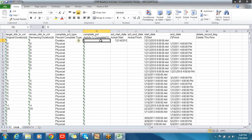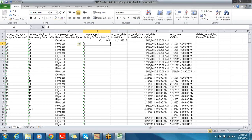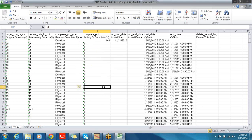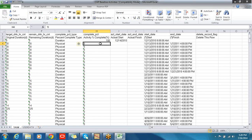I'm going to let Primavera know it's done by typing in 100%. Notice how the 100 lines up differently than the zeros — no other activity in the schedule currently has progress. When you export Primavera data, Excel sees it as a number stored as text, not as a real number. But when you type a number, Excel recognizes it as a number. Don't worry that the format looks different than the other ones — you can leave both the way they are.